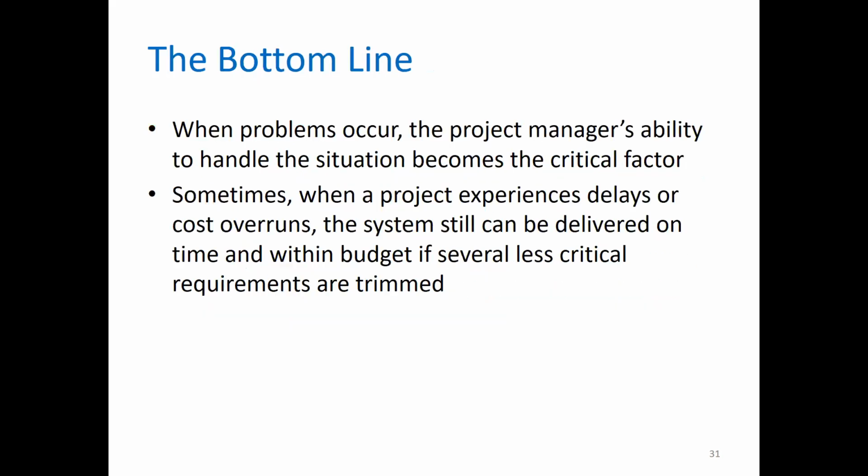So the bottom line is, when problems occur, the project manager's ability to handle the situation becomes the critical factor. Sometimes when a project experiences delays or cost overruns, the system still can be delivered on time and within budget if several less critical requirements are trimmed. Therefore, the experience of the project manager can be a vital aspect. Moreover, staying ahead of the schedule can also be of great benefit. And finally, communication and teamwork is of vital importance.